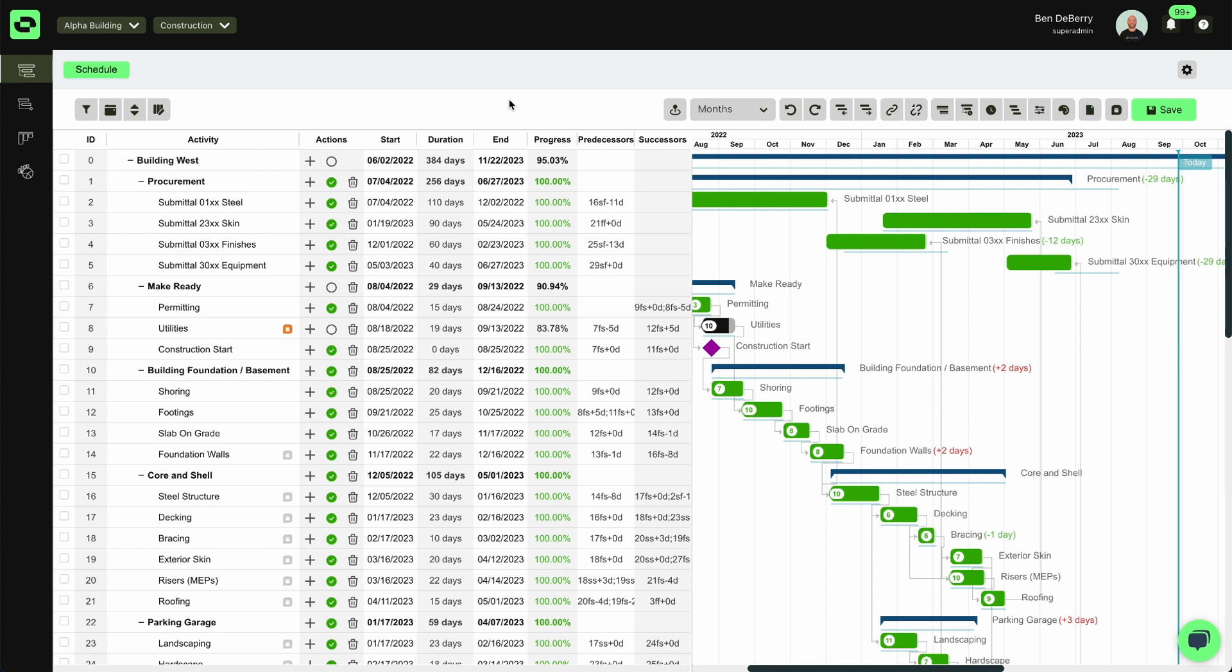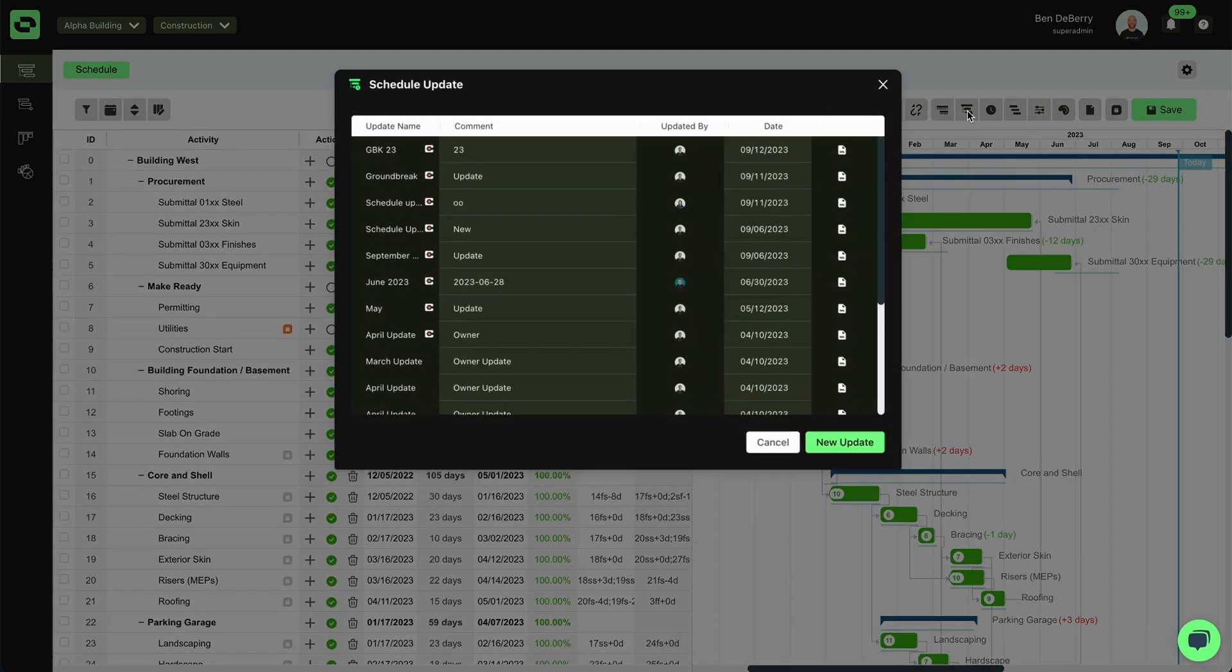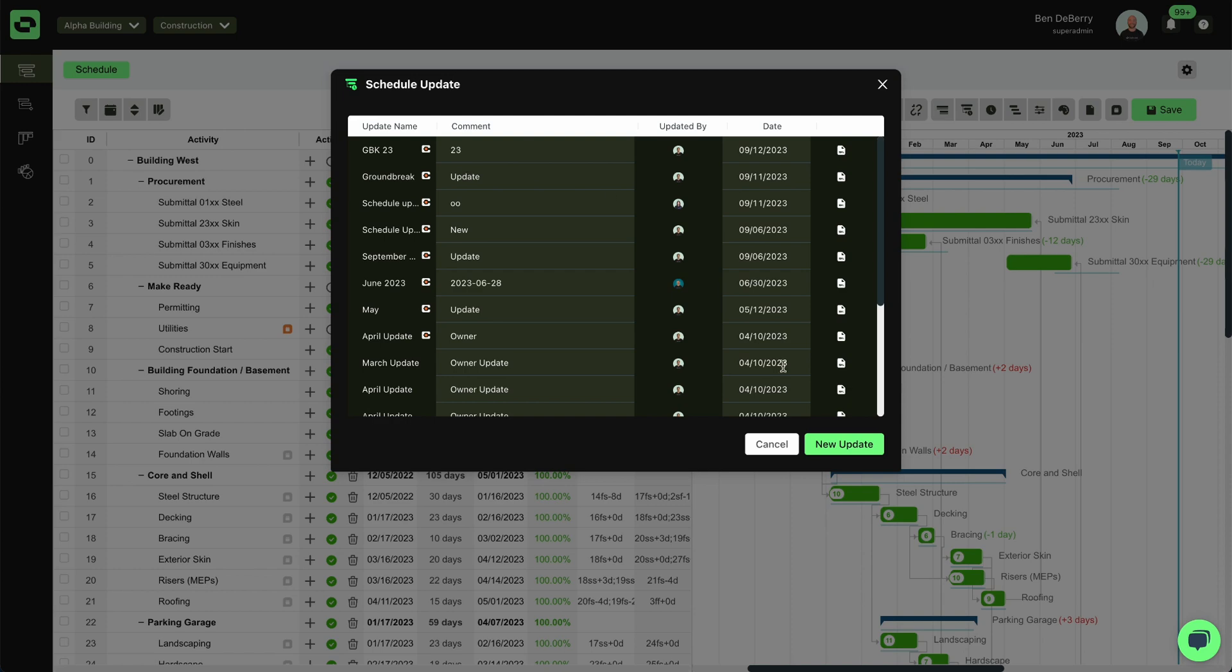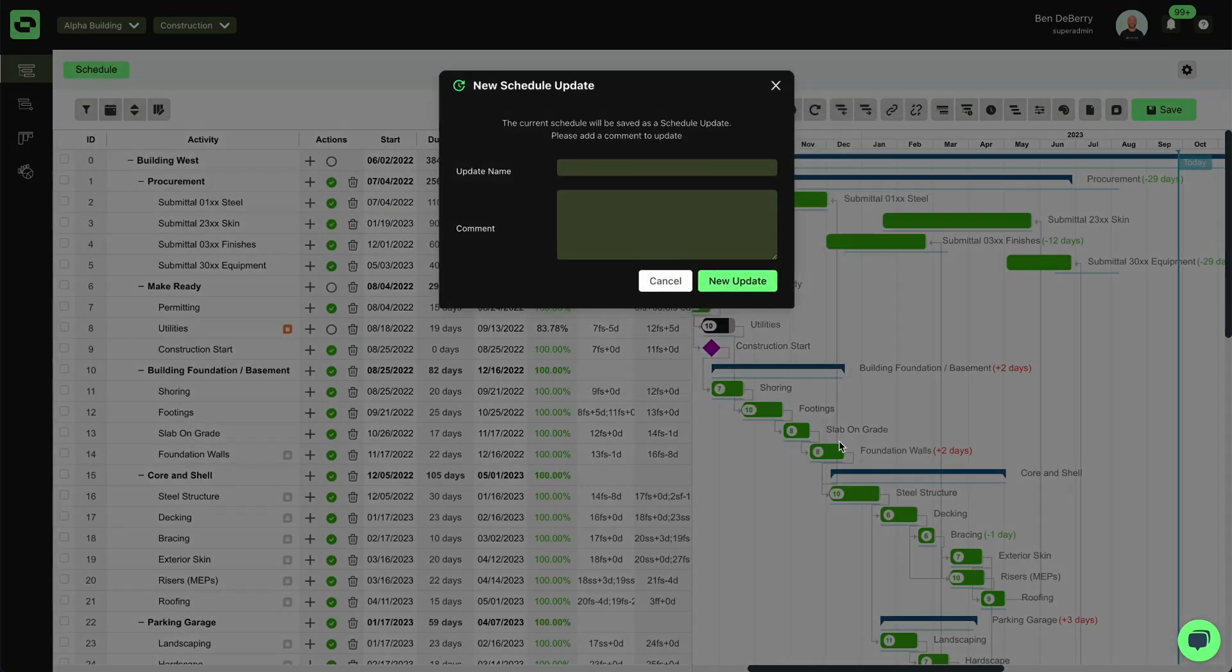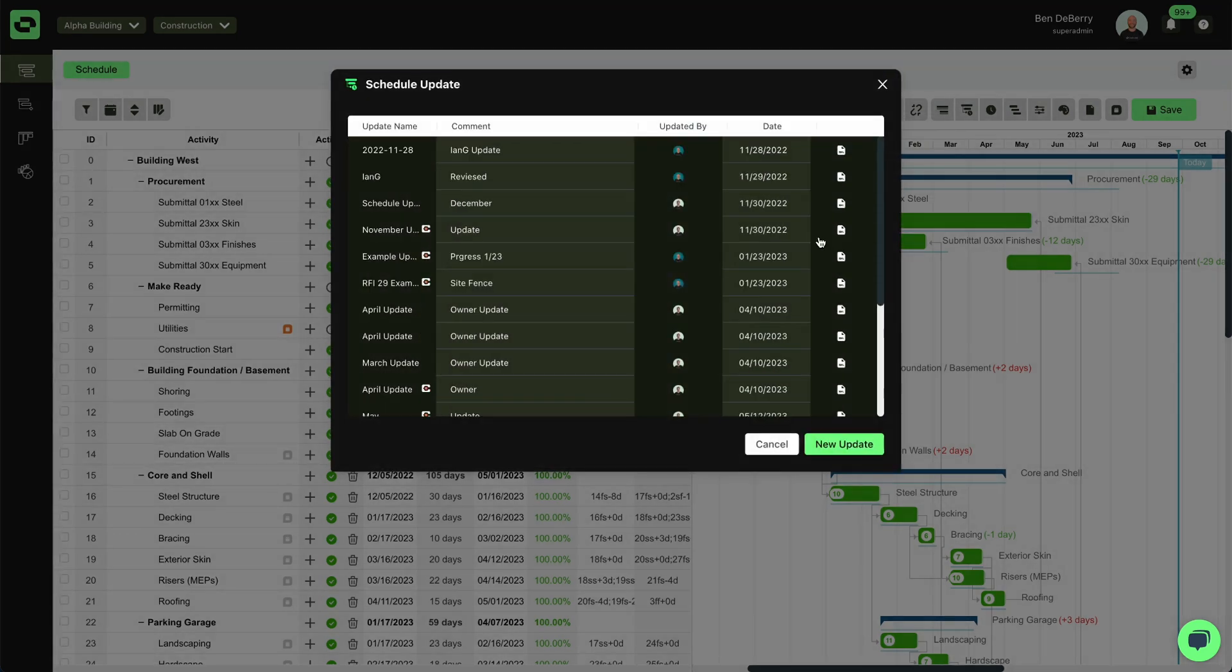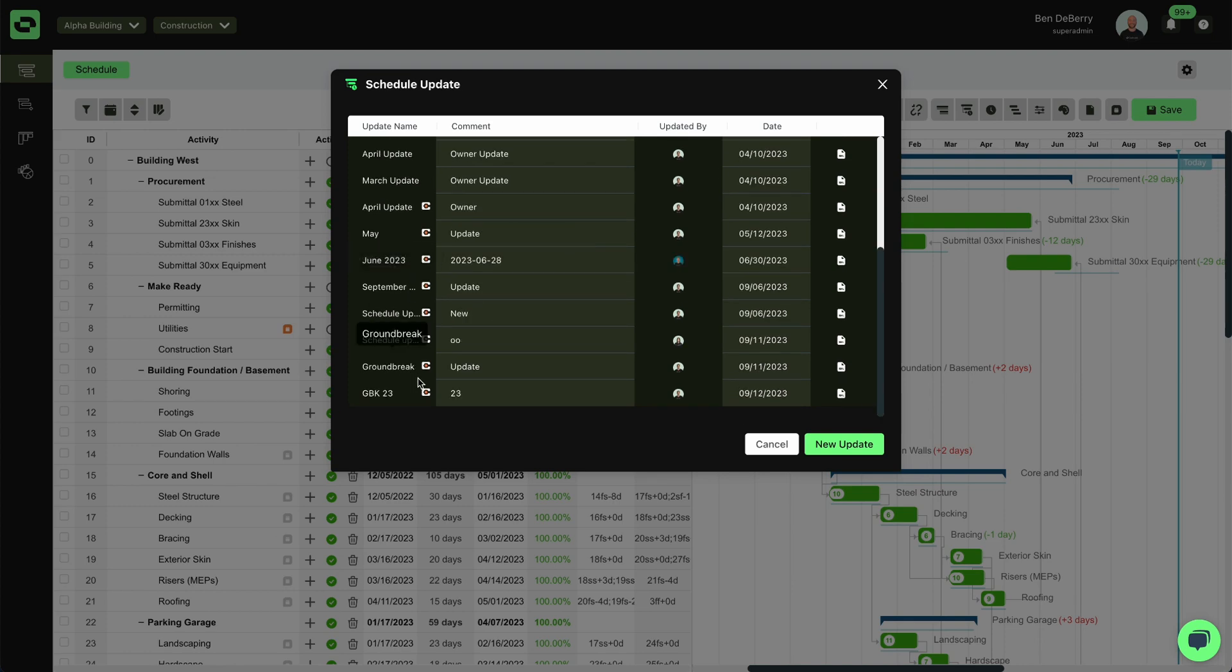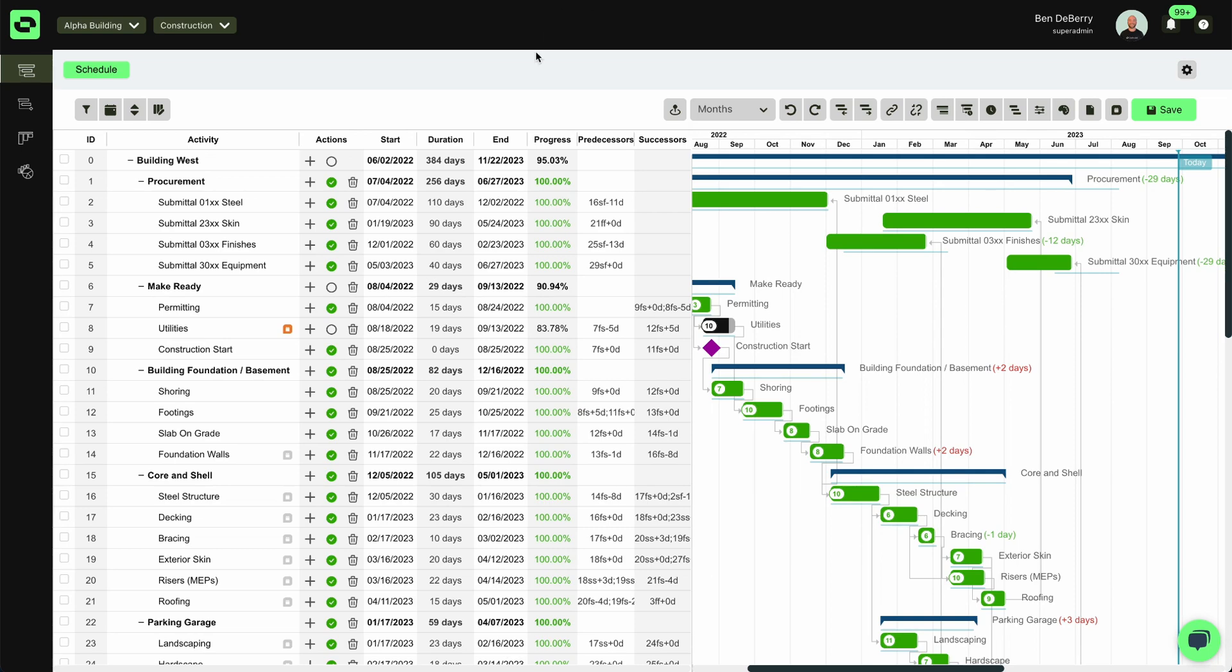That is what will push the schedule that we have here into Procore simply by going here to schedule update, creating a new update, giving it a name and a comment. At the end of that process, we will see those updates and they will have the Procore logo next to them so that we can ensure that that is successful.